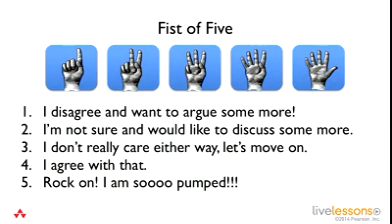One technique I found for getting consensus when you're trying to get people to commit to a story or anything else is something called the fist of 5. A lot of times when you ask people, do you agree with this? You get a yes or no. But sometimes you might get a, yeah, and just by the tone of their voice you can tell they're not really bought in. The fist of 5 is something you can do of making a statement. Do we commit to this story? Do we commit to all these stories for this sprint? And count to 3, 1, 2, 3, and then everybody puts up 1 to 5 fingers.